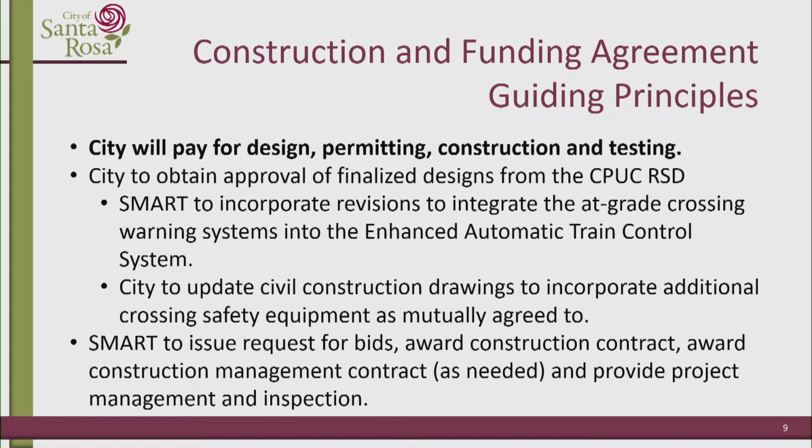The indication from SMART at this point is that that is not going to be presented to the board of directors, that is not something that they're interested in entertaining. So right now, the language in this document is a one-way indemnification agreement. Within that, however, there is a section that describes that all contractors and professional staff will list the city as additional insured. That actually does provide us with some level of coverage should anything inappropriate or any poor construction activities occur during the course of construction. And we're pretty confident that there is enough coverage there that we're okay.